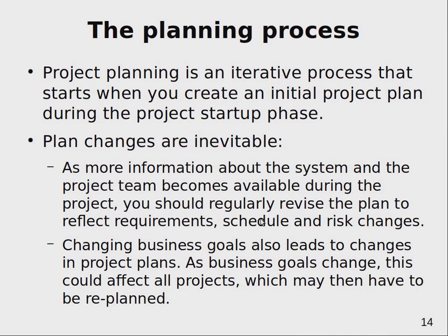And even though you do planning in advance, unfortunately, this more concrete and more precise planning is an iterative approach. Even if you do everything in advance, you can't write a good plan in just one iteration. Even if you don't start actually doing anything, you still need to write one initial plan, then review it, analyze where some weak areas are, and then you need to make some changes, and changes are inevitable because when you do iterations, of course, you give this plan to other involved parties for review.